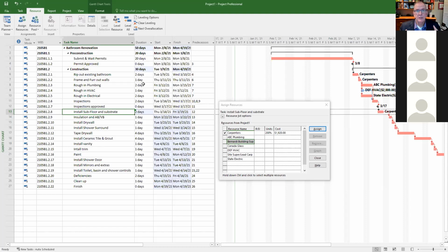It also is something to remember when we talk about cost control. Throwing more people on a project may only make it later because they get in each other's way and it slows things down at a certain point. Definitely it speeds it up, but at a certain point you start to lose efficiency when there is bottlenecks. And we'll talk about bottlenecks in this course too. We'll spend some time in the lecture and in the lab on bottlenecks because that has a huge impact on cost.